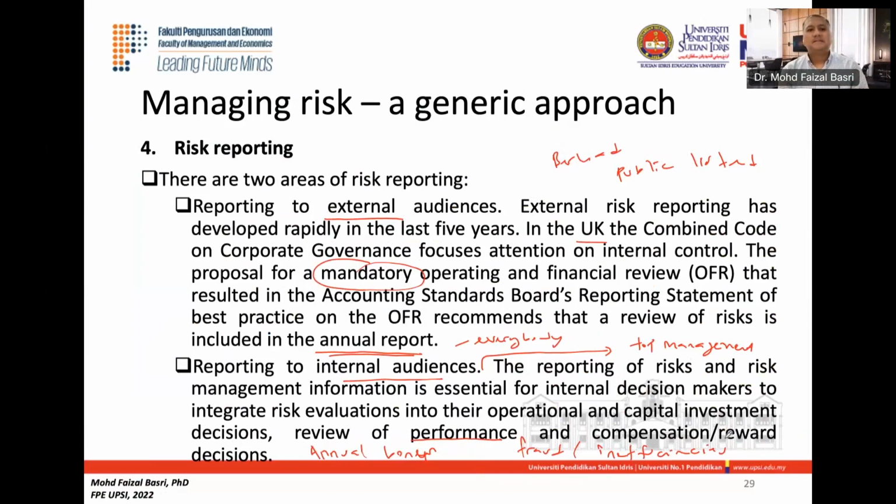And then once you have the risk identified, you need to treat or respond to the risk. So there are the 4Ts I just mentioned: whether to treat, transfer, or terminate, depending on the matrix as well. For high implications and high likelihood of happening, you transfer or terminate.